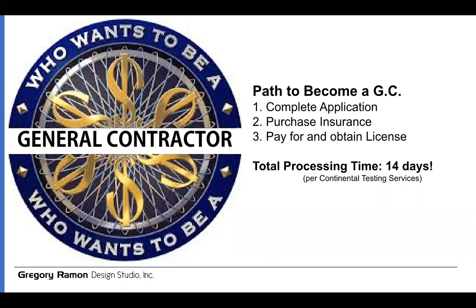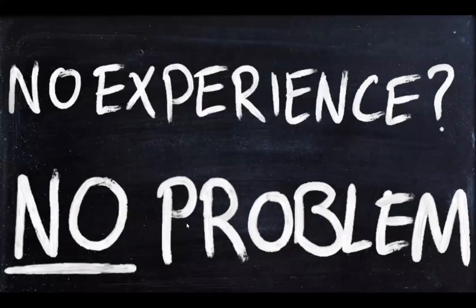The next item is you have to purchase insurance coverage, the general liability coverage, workers' comp. Those different costs are also required before they will issue you a license. And then once you pay the application fee and obtain the GC license, that total processing time might be 14 days. But once you have that in hand, they can legally represent themselves as a general contractor. And there is no experience requirement. But this is all, again, based on criteria in Chicago.